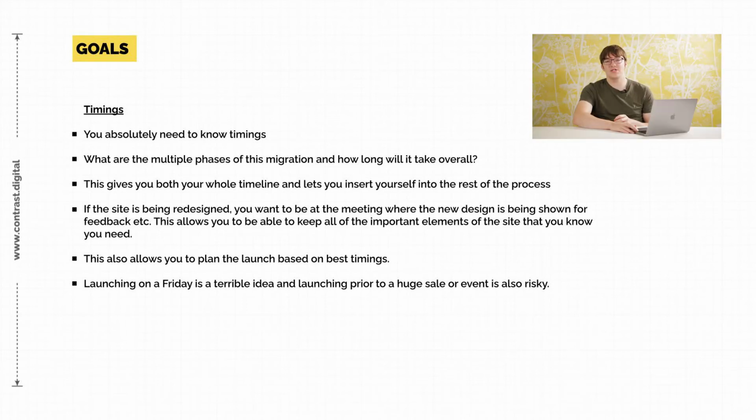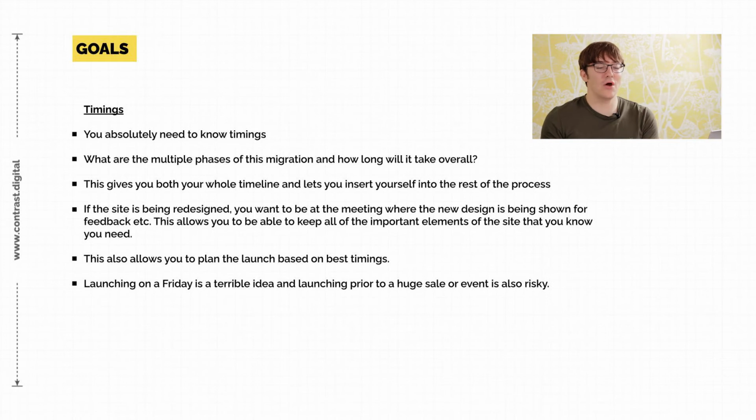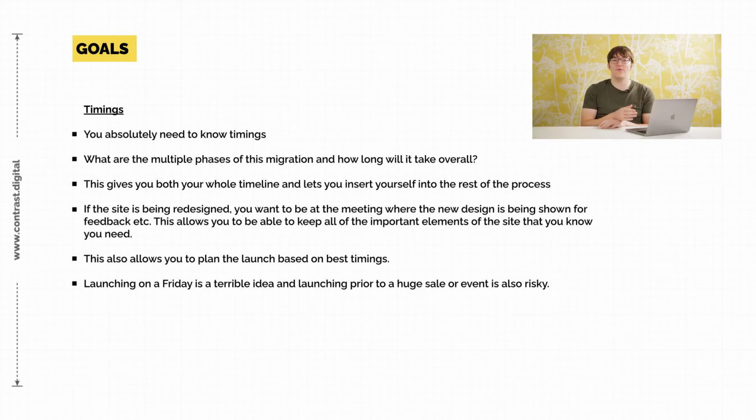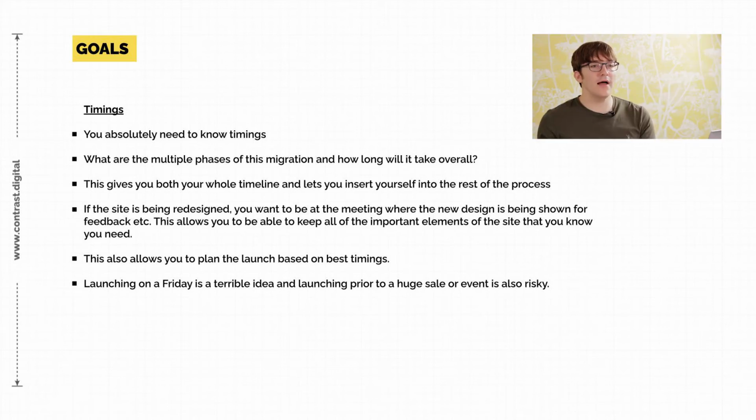The same is said from mapping this out at a high level. You don't want to be doing this coming into, for argument's sake, your best sales period. Again, you're just asking for this to go wrong. Why would you want to potentially jeopardize that revenue? Do it in an off season. So for argument's sake, you know that my best sales period is Christmas, right? Okay, perfect. We're into January. We know that that's the month where the least amount of revenue is generated. Perfect. That's when we're probably going to look to do the launch.